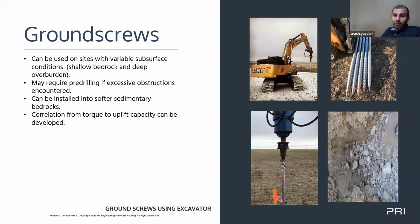One of the challenges of them is, of course, the size. In a lot of cases, you theoretically could go as high as you wanted, but from what I understand, the economics of them kind of cap out about 3.5 inches. And when you're dealing with some of the large wind loads and other bending moments that you have to resist from a racking system, that may mean that instead of having 1 post, you have to go to 2 posts. And anytime you're doubling your amount of foundations, you're typically doubling your potential for ground disturbance risk. And there's a lot more components that need to be aligned.